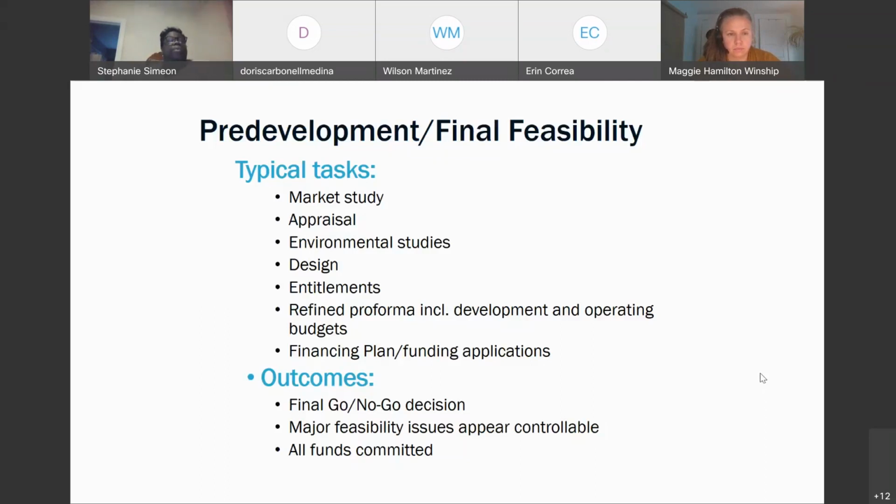If you're like, I don't care what the numbers say, I'm going to do this anyway. Fantastic. Well, you get your environmental report, and you've got some challenges there. Based upon what you find in your environmental report, sometimes just to get the virgin soil, you're looking at $100,000 right off the top. That's something that you can't see.